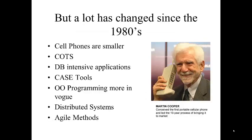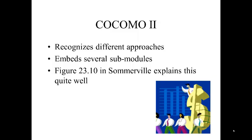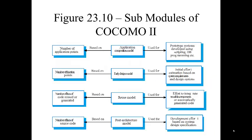A lot has changed since the 1980s: cell phones have gotten smaller, we have off-the-shelf components, more database-intensive applications, CASE tools, object-oriented programming, distributed systems, online systems, and agile methods. COCOMO 2 recognizes these changes and has several sub-models. Figure 23.10, found on page 637 in the 9th edition, shows the sub-modules of COCOMO 2. There are four: the application composition model for scripting or database programs; the early design model used after requirements are established, using function points converted to lines of source code; the reuse model to compute effort for integrating reusable components or auto-generated code; and the post-architectural model for more accurate cost estimation after the system architecture is designed.